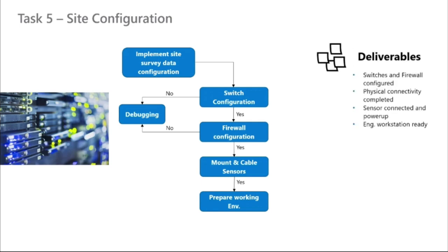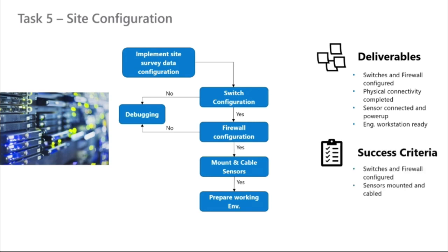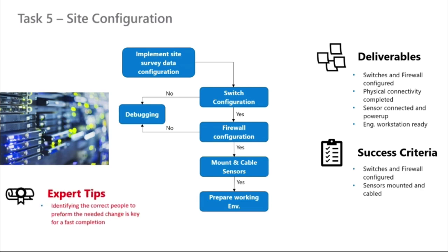So the deliverables are quite evident. It's switches and firewalls configured, physical connectivity completed all the way from the sensor onto where the sensor is going to be mounted. Sensor is connected and powered up, and then the engineer workstation is ready. All of this needs to be put into place in order for us to progress to the next slide, which is to actually deploy the sensor.